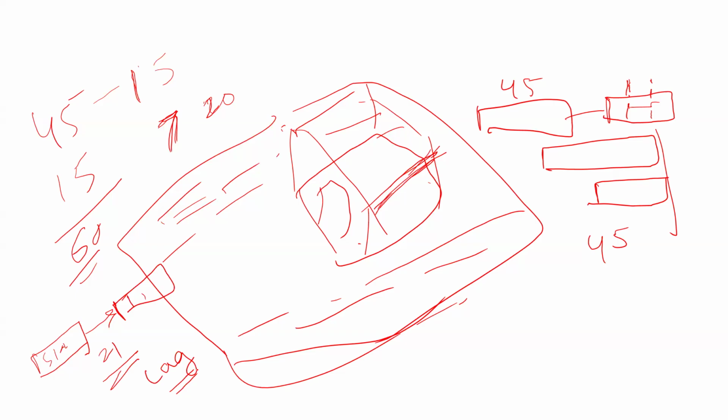Yeah. It's an intentional gap which is to be kept because, see, if you don't do that, Swati, in simple terms, you'll have to create a dummy activity, call it curing, and show it as 21 days. You would have to show it as an extra activity. So rather than that, they say that there is a 21 days lag. It is a waiting activity, frankly speaking. In civil construction, it's not waiting, you need to put the water and all that. But there are a few things. For example, when you order some hardware, there is always a procurement lead time. You know that, right? Procurement lead time, what do you do, Swati? You wait. It is that vendor who is working on that, correct? Right. Correct. So rather than showing a dummy activity called wait for the hardware, show it as a lag. That's called a lag.